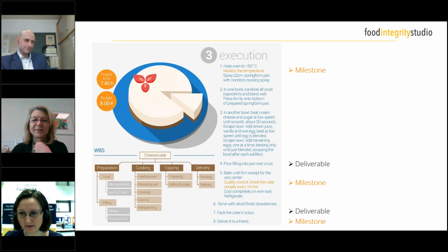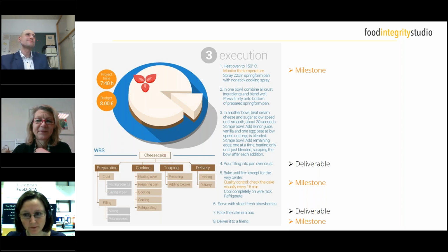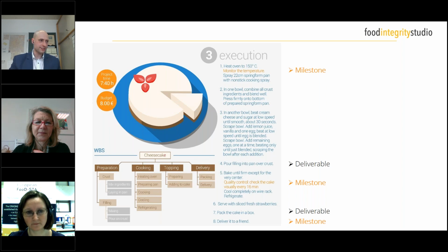Then we have a question from Marlene Vestra. Do you review and evaluate after the project or during the project? I would say this quite clearly depends on the sort of project. If you, for example, in this case, have a very, let's say, suspicious friend who would like to really control your process, they really want to make sure that you're making a good cheesecake, then your friend could, for example, ask for an interim evaluation. So he or she is coming by in the middle of your project and is evaluating how far you have come, what you have already achieved, and how the quality of your interim deliverables is. So that could be possible. In most cases, I guess most people would just do the final evaluation. But it could also be done on an interim basis, absolutely.